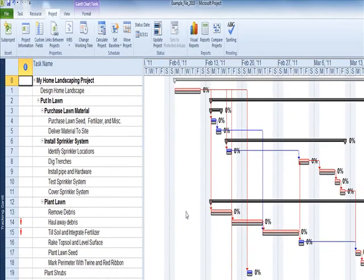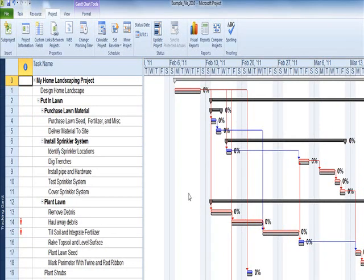The gray bars that appear represent the baseline task schedule. Once the baseline is set, any changes in the plan that are different than the baseline will become obvious and immediate, assisting you in progress or status analysis.